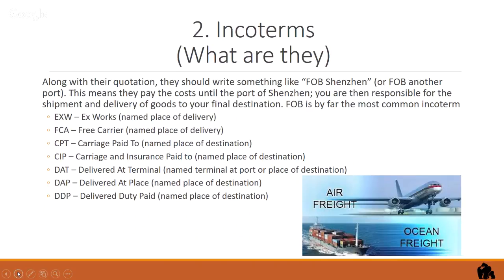You are responsible for the shipment of delivery of goods to the final destination. In other words, you are responsible for that travel expense. And generally, it's going to be FedEx, something like this. They'll pick up the bill and you pay them. Okay, FOB is by far the most common Incoterm. Incoterms just means these shipping terminologies.